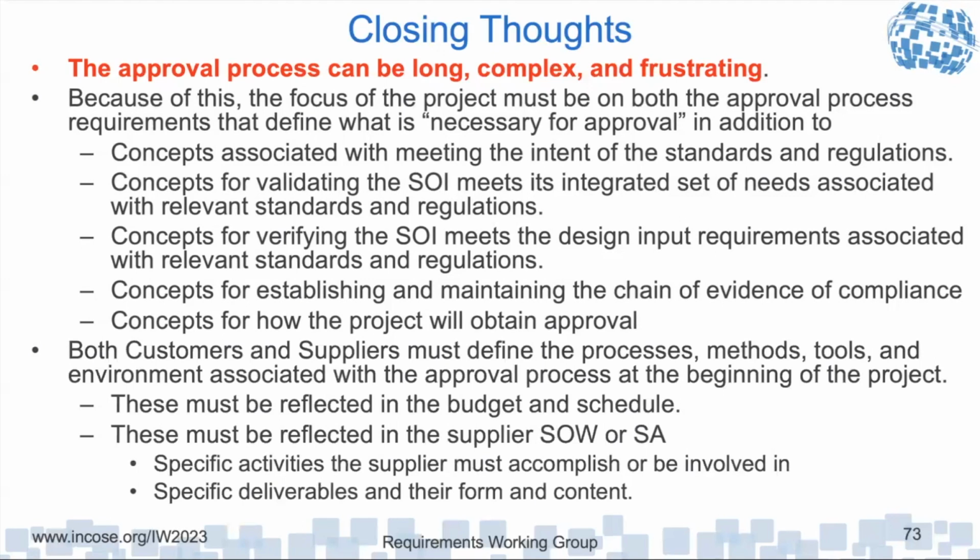These must be reflected in the budget and schedule, and these must be reflected in the supplier statement of work or supplier agreement: the specific activities the supplier must accomplish and be involved in, and the specific deliverables in their form and content.